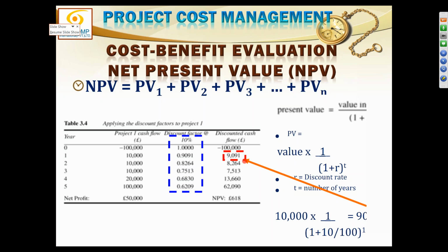Yes, sir. Let me put it another way. I promise you that I will give you 10,000 rupees after 1 year. But for the whole 1 year, that 10,000 is not in your pocket. It is just an assumption that you will get it. And you also know that that 10,000 is worth only 9,091 rupees now. Therefore, you can say, please give me this 9,091 rupees now, and I am not ready to wait for 1 year. So you are leaving out 9 rupees. That is the allowance for the 1 year. In present money, you are satisfied with 9,091 rupees. Is it okay?